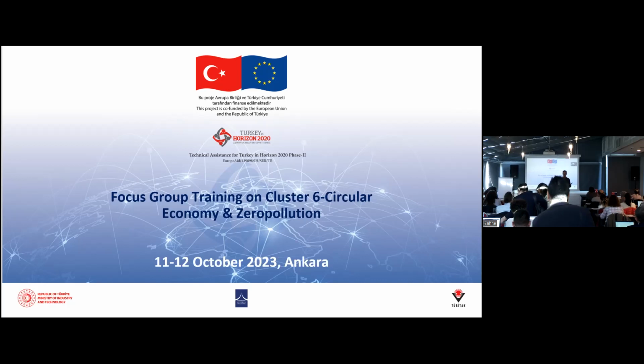On the contrary, if you have a prototype that is up and running with X% accuracy, with X% efficiency, with X% something, then you have a milestone. Or even if you don't want to be that specific, let's say at least or around X% something. Do you follow that? Because this is very important. That makes the difference between a winning proposal and a failed proposal.